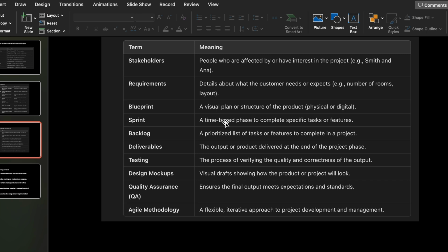So if you break the work down into small pieces, first we'll be building the foundation. So let's say the first couple of sprints, the first month, will be spent building the foundation. Okay, so every 2 weeks we complete something, we show it to Anna and Sumit, and they approve it. Okay, so iteratively we will be building the entire house. That is what we call a sprint.